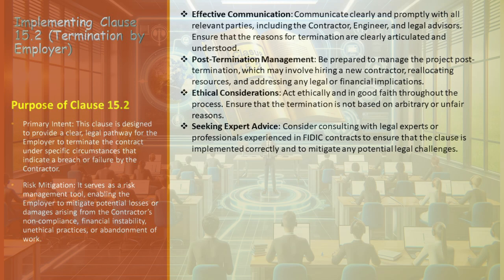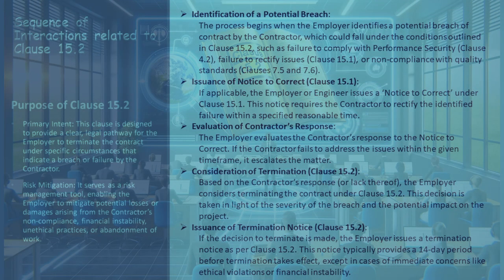To fully understand the application of Clause 15.2 in the FIDIC Yellow Book, it's essential to detail the sequence of interactions that typically occur when this clause is invoked. The process initiates when the employer identifies a potential breach of contract by the contractor. This breach could be related to non-compliance with performance security (Clause 4.2), failure to rectify issues (Clause 15.1), or non-adherence to quality standards (Clauses 7.5 and 7.6). If applicable, the employer or engineer issues a notice to correct as per Clause 15.1, demanding the contractor to remedy the identified failure within a set reasonable period.